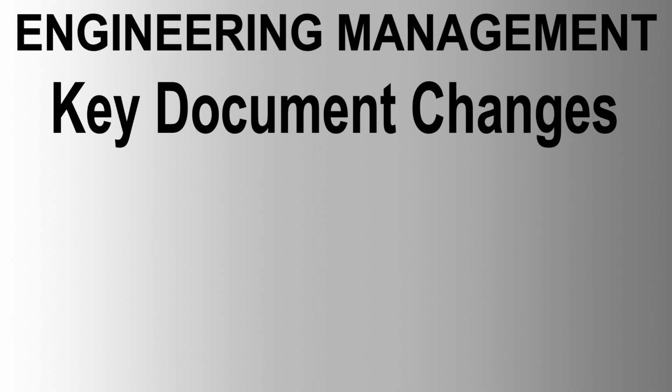6.2. File KDCN in history file and update KDCN index. Ensure the KDCN is filed in the history file and the KDCN index is updated accordingly. By following these structured steps, the Key Document Change Notice (KDCN) procedure ensures comprehensive and consistent documentation and management of changes to key documents, supporting effective project execution and communication.